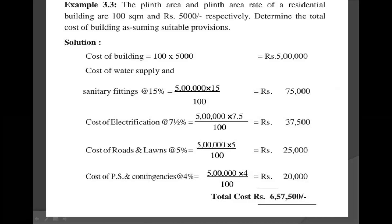Final provision: cost of PFPS means petty supervision and contingency at 4%. Formula: cost of building multiplied by PFPS percentage divided by 100, which is 5 lakhs into 4 divided by 100, equal to 20,000 rupees. So total: add cost of building plus remaining provisions — 5 lakhs plus 75,000 plus 37,500 plus 25,000 plus 20,000. Therefore total cost of the building equals 6 lakh 57,500 rupees. This is the plinth area method problem.